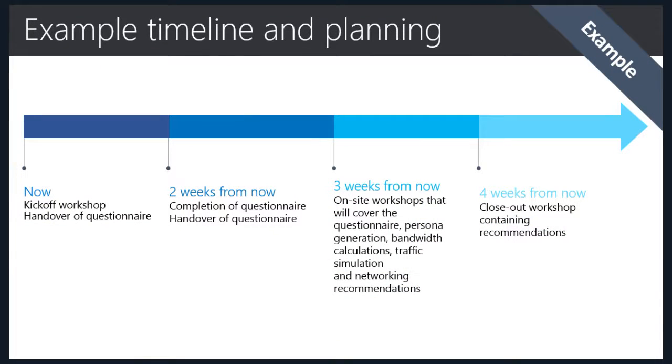So as an example timeline, I quickly talked about, hey, this is what we expect. We sort of expect about a week's worth of effort. As far as a timeline, we expect that you'll do a kickoff workshop and you'll hand over the questionnaire. It'll usually take the customer a week or 2 for the questionnaire to be completed. You'll check that, make sure it's complete, and then about 3 weeks in, you would be doing the on-site workshops.